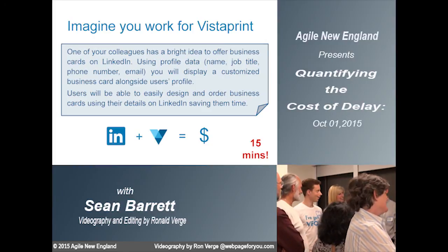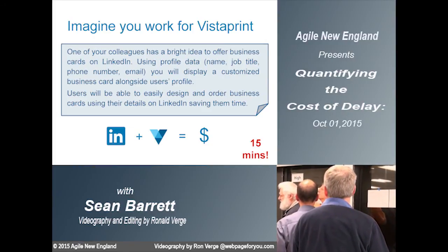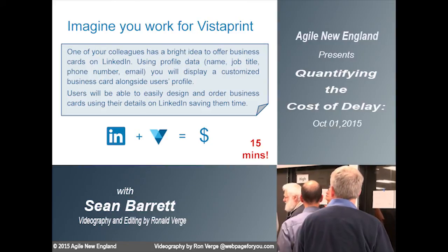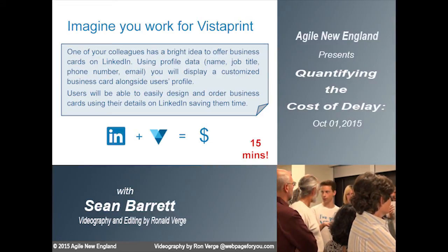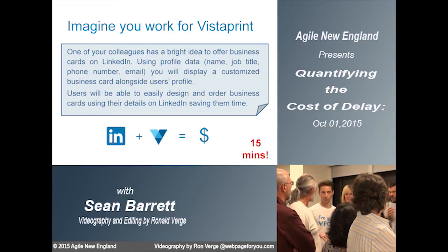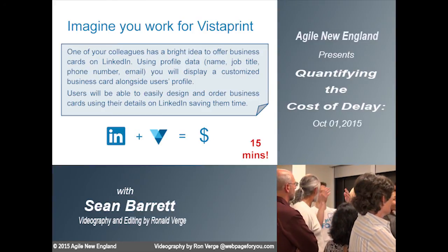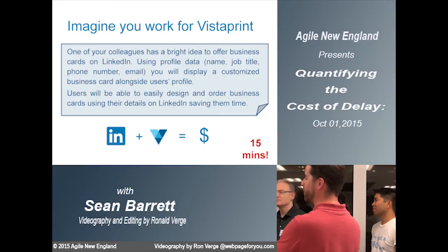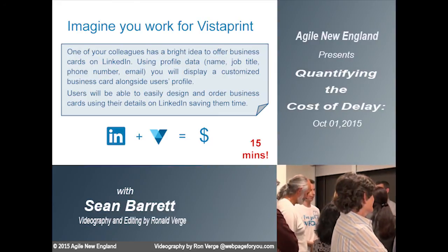Part of the question is cost to the company. How much bigger the incremental cost to make things happen? Would you need extra capacity? Perhaps, right? Anything that we do means that there's a whole bunch of other ideas and projects that we don't do. Does it cost to delay the rest of your current work? Yes, there's a cost. It's the opportunity cost, right?